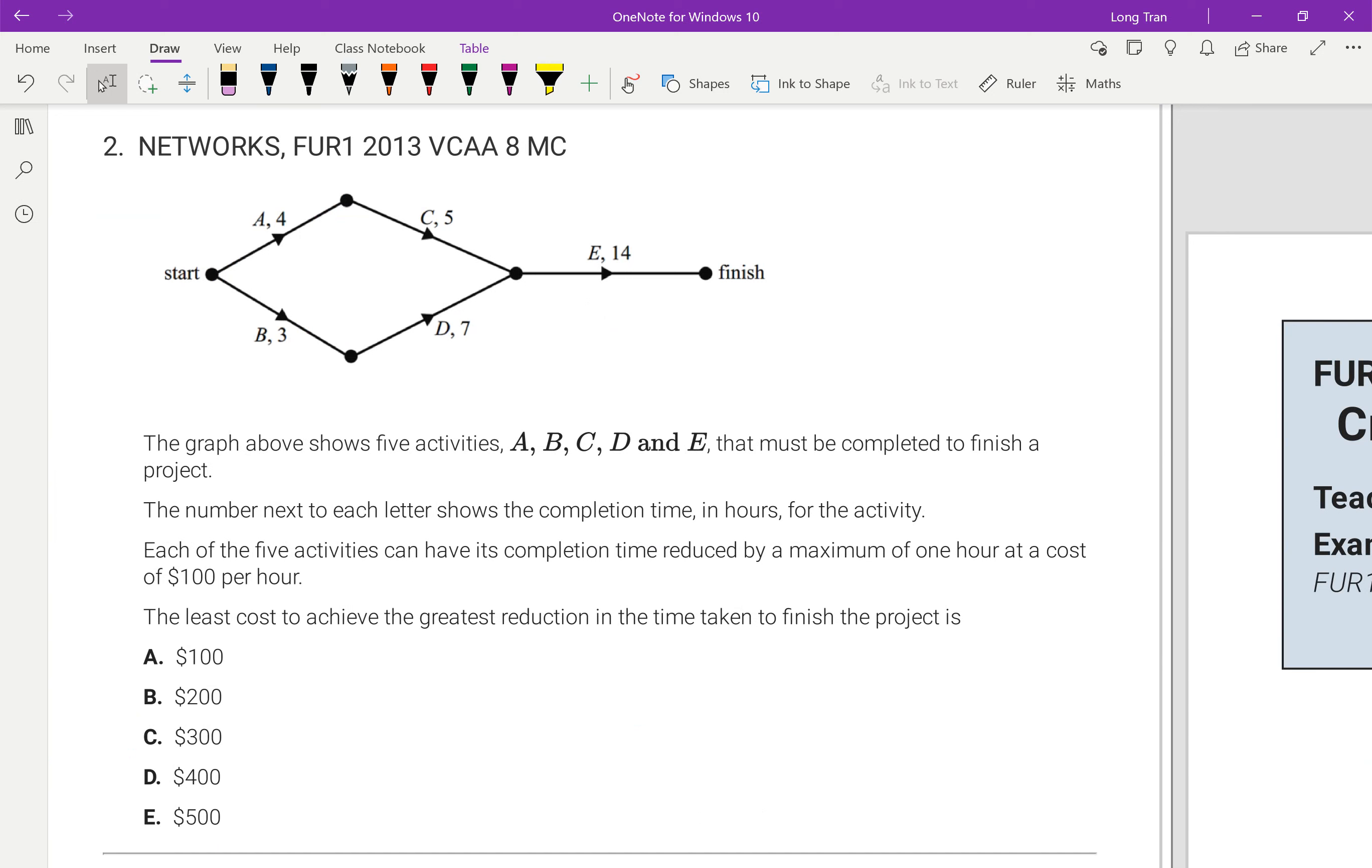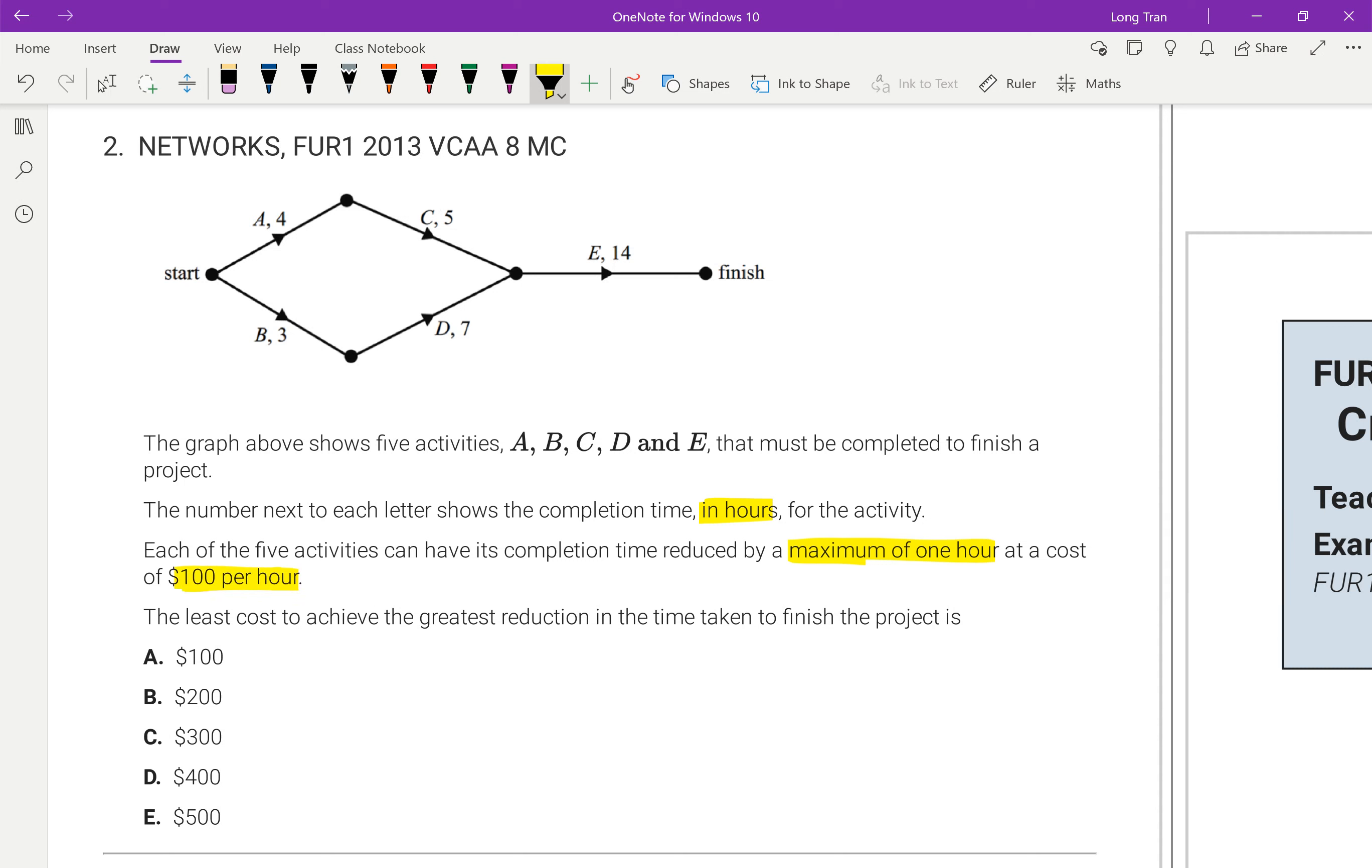You've got activities A, B, C, D, E, so less activities than before. The number next to each letter shows the completion time in hours. Each of the five activities can have its completion time reduced by a maximum of one hour. So that's how much you can reduce. And each time you reduce it, it's $100 per hour. The least cost is what you're looking for to achieve the greatest reduction in the time taken to finish the project. And here again, what you're meant to be doing is find the critical pathway to begin.